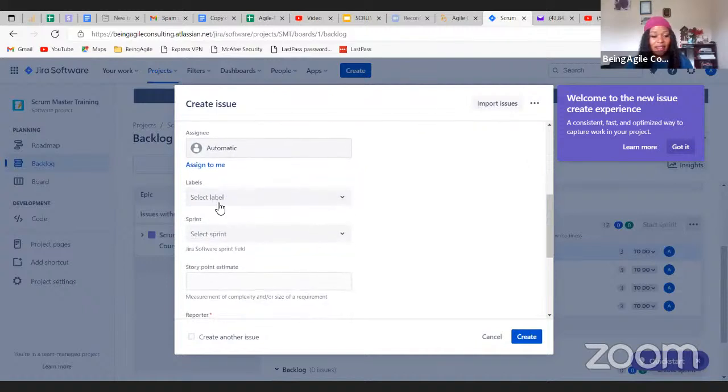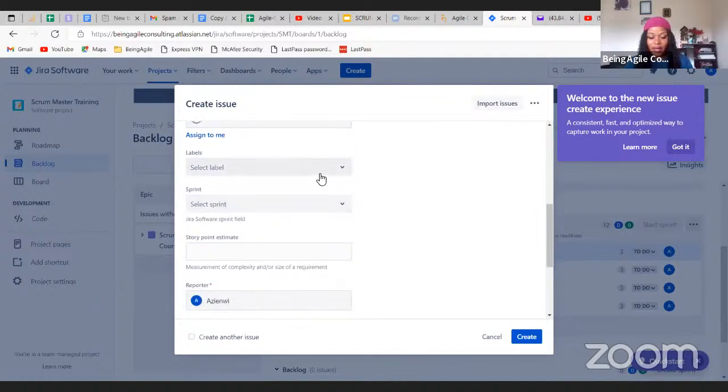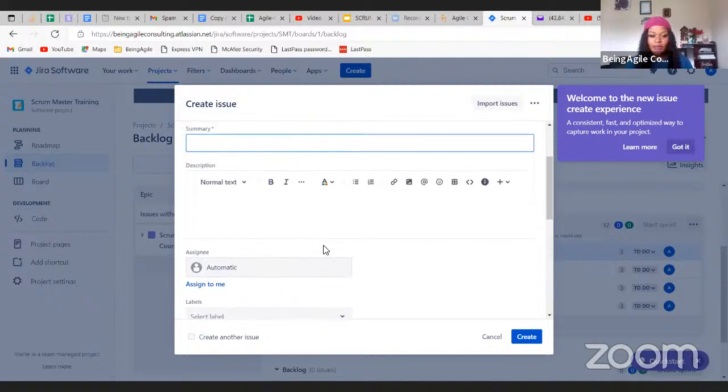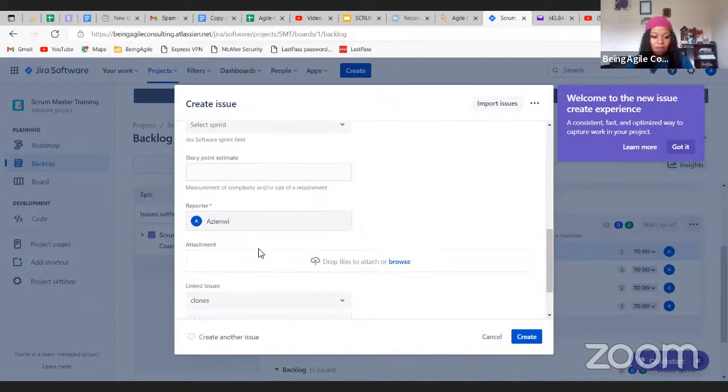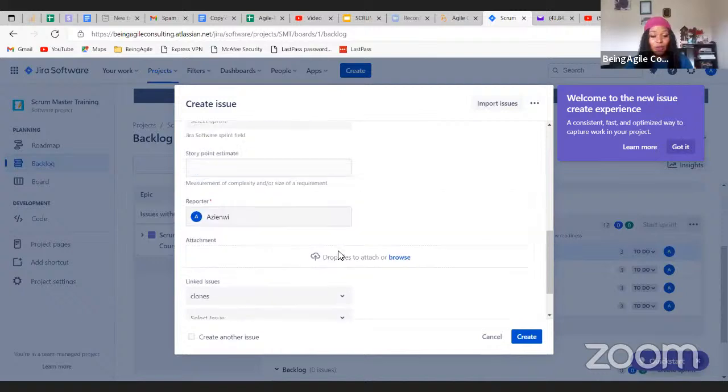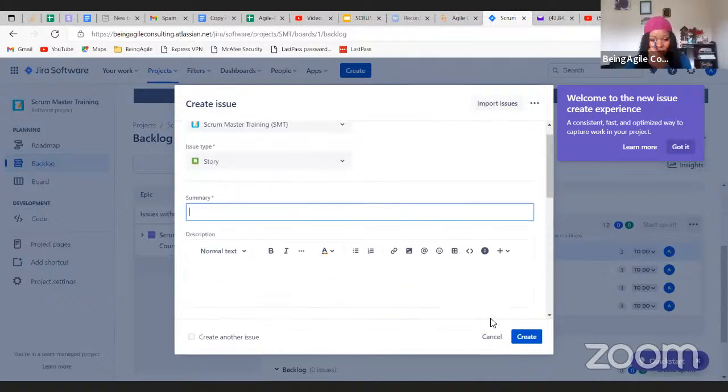But the assignee and estimate are supposed to be empty because the team is supposed to be the one to put in that information through conversation. You or the PO will complete that remaining information during the backlog refinement session or sprint planning session. But that's my cue to know whether the story is truly detailed enough or not.